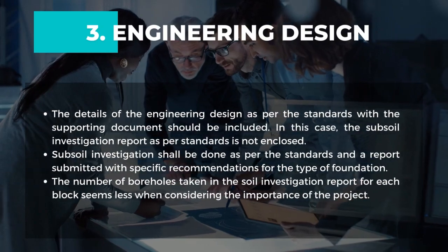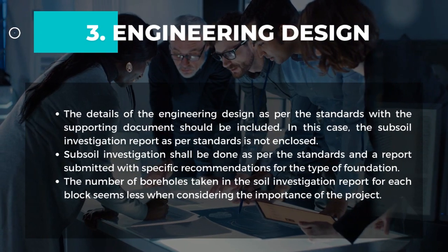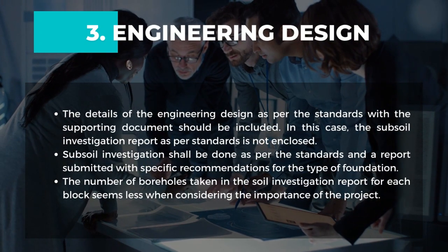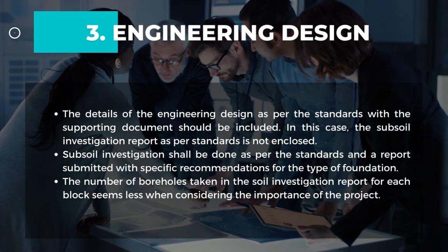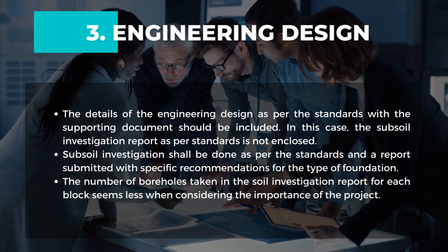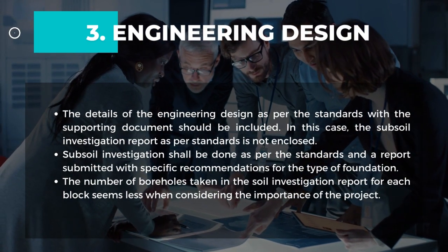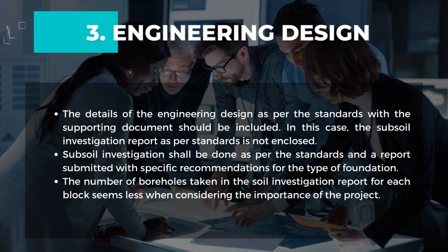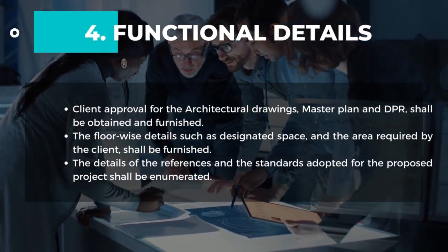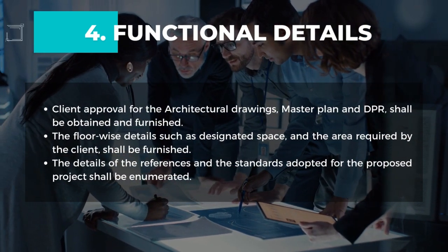Engineering design. The details of the engineering design as per the standards for the supporting document should be included. In this case, the subsoil investigation report as per standards is not enclosed. Subsoil investigation shall be done as per the standards and a report submitted with specific recommendations for the type of foundation. The number of boreholes taken in the soil investigation report for each block seems less when considering the importance of the project. Functional details. Client approval for the architectural drawings, master plan and DPR shall be obtained and furnished.